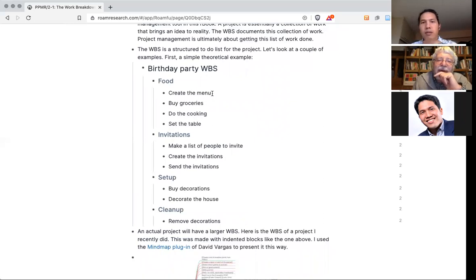What I wrote later was: uncover gaps, what you don't know about the project, what needs to be done, and then interview people who did something similar, reuse past experience, etc. So it means at some stage there could be project tasks which are learning tasks. It's not really for the project itself. It's just to allow people to learn how to execute later. And of course, the learning must be done before the execution of the task.